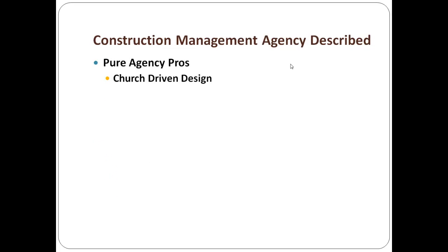Pure agency pros is that it's a church-driven design where the construction manager often is hired before the designer, brings in designers, and works through it to make certain that the quality and the input of a builder is in place and helping to keep the design within budget, to make certain that the design has the quality materials and supplies that the owner wishes to have in the building. And it's a church-driven design, not a builder-driven design.